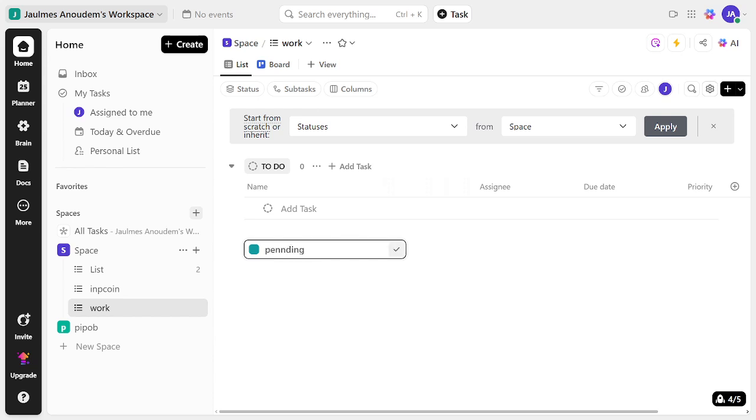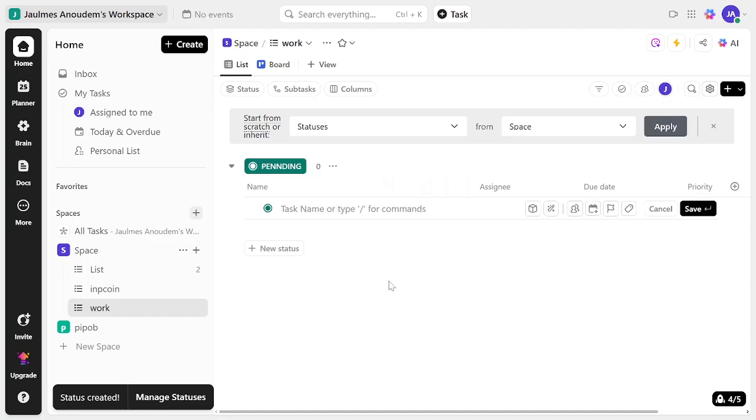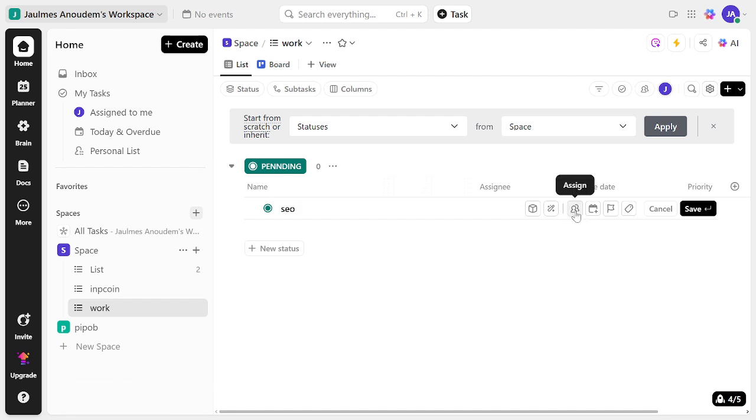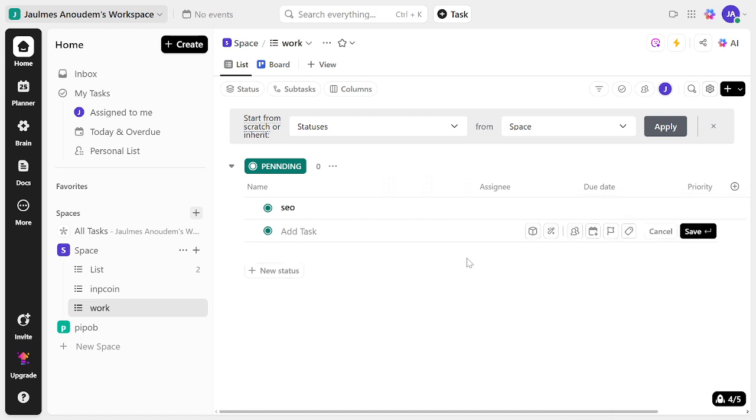Moving on, let's create tasks. Navigate to your project page and click on Create New Task. Input all required details, set its status, and assign it to a team member. This is crucial because tasks are the backbone of your project, and assigning them correctly ensures the work is evenly distributed. Now you've got your tasks set up, let's link them to a sprint.